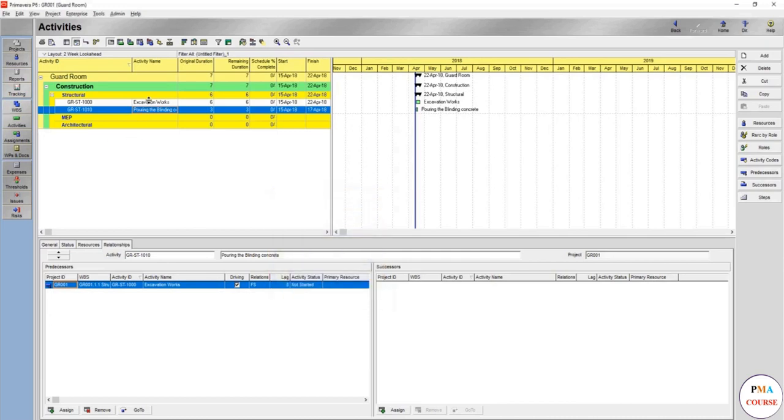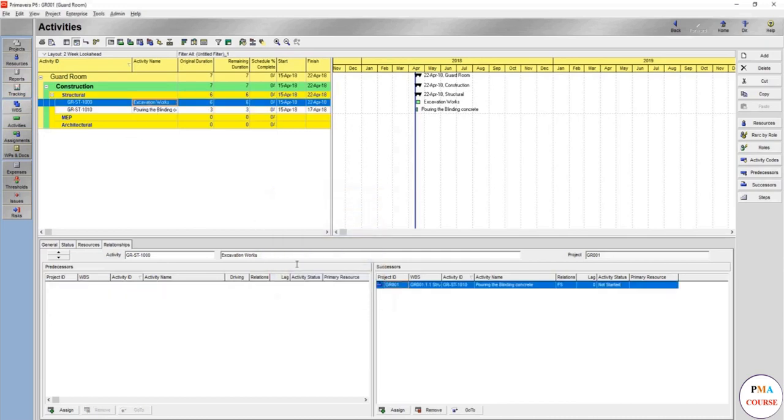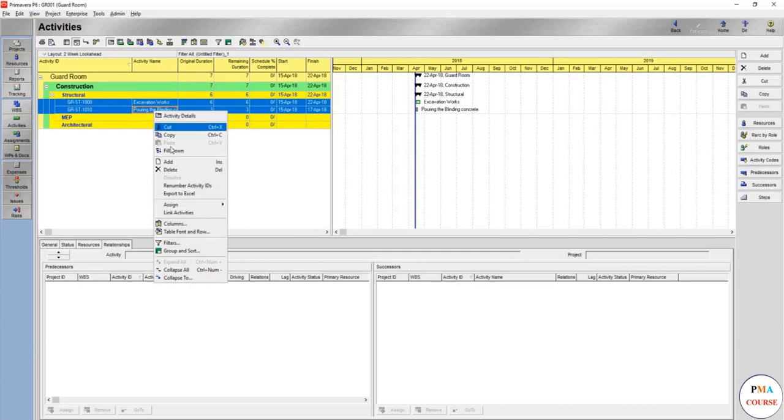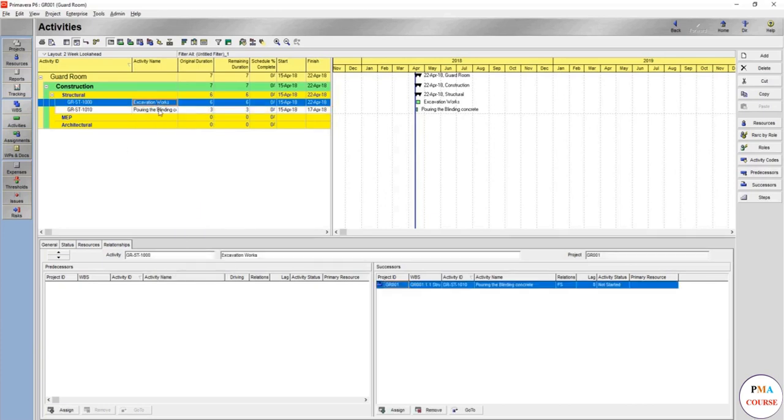Or you can come here to excavation, it will automatically appear in the successor. You can also assign and show it here, or you can select both activities and right click link activities. Automatically the first one you selected, then the second one will come as successor.